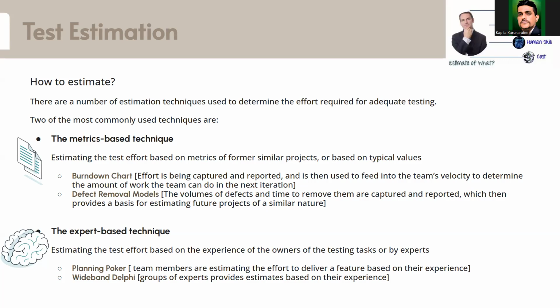So basically, they can quickly do the estimation based on this data and some of the metrics. They know how their masons work: how much effort a senior mason, a junior mason, a trainee, and an intern, all these different kinds of people they hire, can produce. They know how much effort they can put in, and based on that they can derive even the duration and the number of people they can put on it. All this they can do quickly, based on the existing data and some of the metrics.